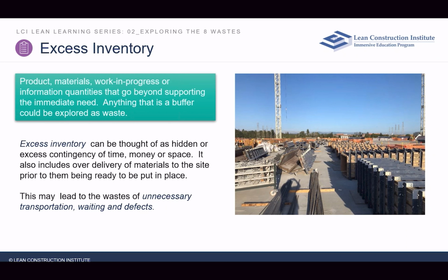We spent hours and days organizing and getting all this material put in. Now, guess what we get to do? We get to order material and have the hardware installed on the door before it shows up to the job site. So we've taken the mindset of this hardware room where we organize and set up all these great things and waste all this time. We now have the suppliers doing it for us.